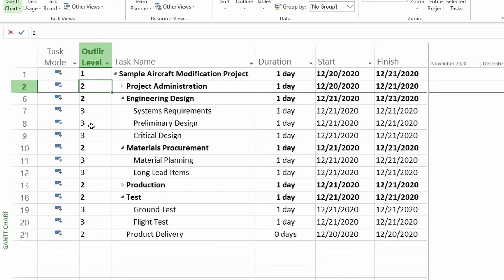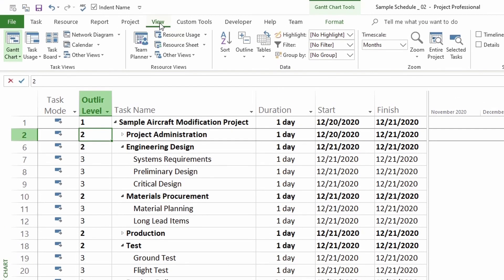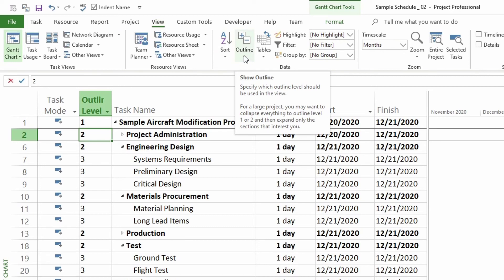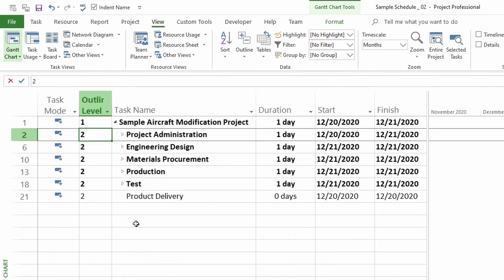I don't even need this outline level column displayed. I just need to know that I want to do it. But here we can see it clearly. So I'm going to go over to my view tab and then click on outline. Open that up and then click on level two. And you can see everything has rolled up to level two.